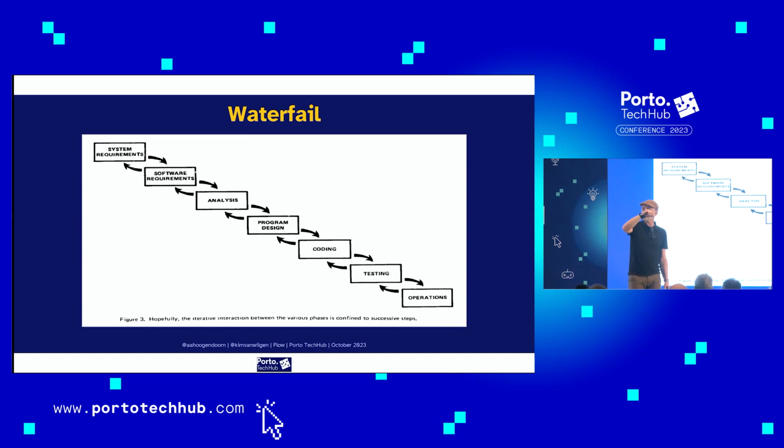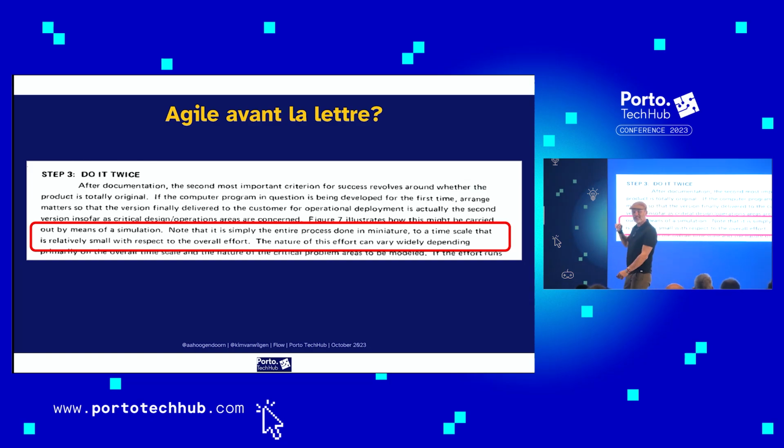You know that you always need to go back to the requirements. People come up with new ideas. You go forward and back, et cetera, et cetera. It gets even better because in the same white paper, he also said this: note that it is simply the entire process done in miniature to a time scale that is relatively small in respect to the overall effort.